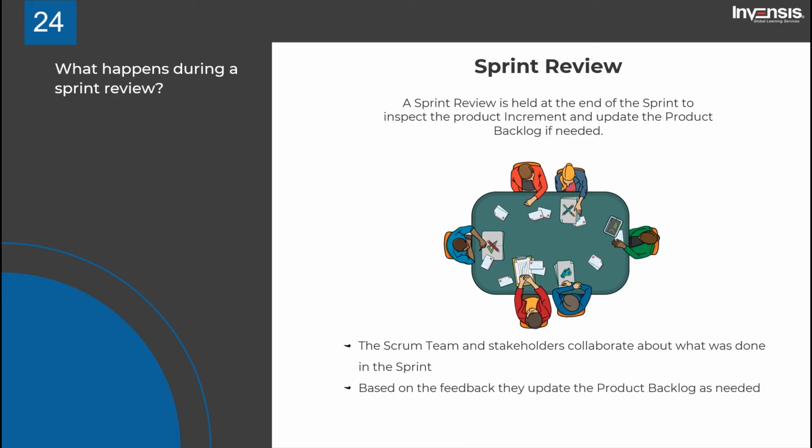So, the result of the sprint review is a revised product backlog that defines the probable product backlog items for the next sprint. During the sprint review, the team does research on the marketplaces and estimates the budget, potential capabilities, timeline, and marketplaces for the upcoming releases. Note that sprint review doesn't have a fixed time frame. It lasts at most for 4 hours for a 1-month sprint, or can be shorter for shorter sprints.